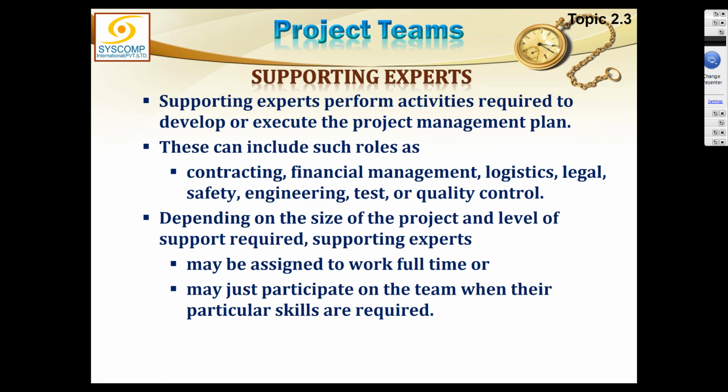So coming back to the example of Nadra, there we had 8 different consultants on a short-term basis for 6 months. When the project was in initial planning, we had 8 different consultants in 8 different areas who helped us plan. Once the planning was done and we were actually in the procurement stage, these consultants were laid off, and then we moved on when the contracts were finalized with the contractors.